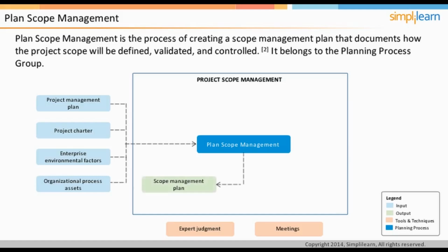The scope management plan describes how the project scope will be defined, like who will be involved in the process, whose inputs will be sought, what techniques may be used to get these inputs, etc., developed, that is, in what form will the scope be elaborated and documented, monitored and controlled, and verified. The plan may also describe how the WBS will be created from the scope statement, how changes to the scope will be managed, how deliverables will receive formal acceptance, etc.